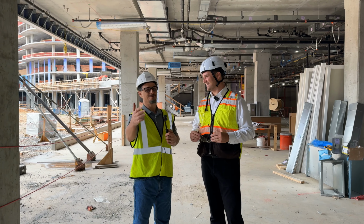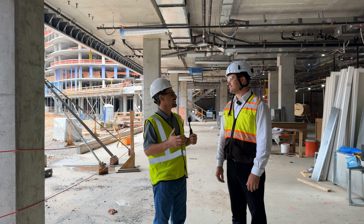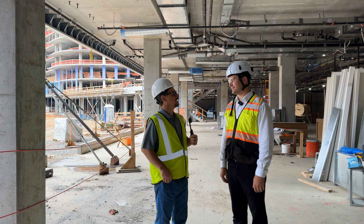I look at it like you're almost agreeing up front to partner together to get this thing done, and you get it done a lot faster. Right, it's faster, exactly. And you have more flexibility. The typical construction method, for those who don't know, is what we call plan and spec. There's an architect, an engineer involved, mechanical contractors, but plans are developed, a design is put out, and it's put out to bid. Multiple bidders go in on it, and somebody's low bid gets picked. But design build is a little bit different than that.